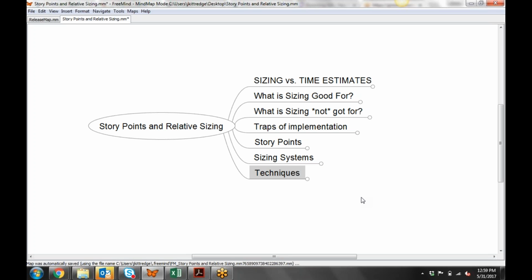And that's about what I'm about to say. The issue is all of the estimates are based on the specifics of the team that are doing the work, right? So our estimates from TrueCare and the estimates from Acme X, if I say it's 8 story points and they say it's 8 story points, 8 story points for us could be 3 weeks worth of work and could be 5 months of work for them. We don't know because the teams that are doing the work is relative to their system. So generally speaking, when you're doing these sorts of story point estimates, these sorts of sizing, it really should be confined to the specific team that's working.